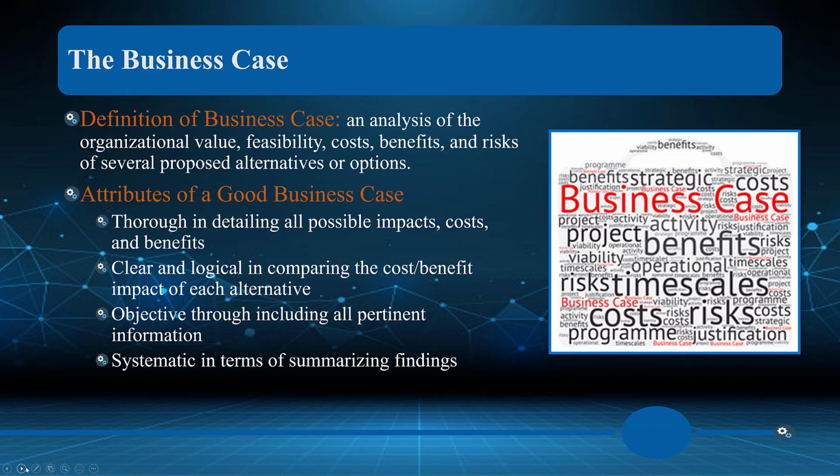Okay, so a business case is an analysis of an organizational value, feasibility, cost, benefit, and risks of several proposed alternatives or options. So we now are going to bring forth a document that is going to suggest the project we want to do, provide alternatives to the project we want to do, and clearly document the value of the MOV as well as the value of the project. It's definitely going to cover the who, what, where, when, how, and why. So as you look at a business case, you want to make sure that you cover those elements, okay? Why are we doing the project?